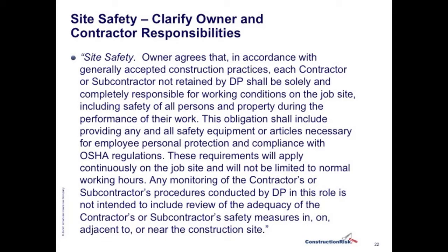This obligation shall include providing any and all safety equipment or articles necessary for employee personal protection and compliance with OSHA regulations. These requirements will apply continuously on the job site and will not be limited to normal working hours. Any monitoring of the contractor's or subcontractor's procedures conducted by the design professional in this role is not intended to include review of the adequacy of the contractor's or subcontractor's safety measures in, on, adjacent to, or near the construction site." Close quote.